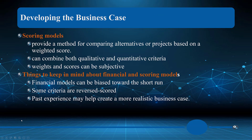Scoring models provide a method for comparing alternatives or projects based on a weighted score. We apply a scoring model equally to each and every project or alternative. It can combine both qualitative and quantitative criteria — weights and scores can be subjective, but the most important thing is to apply it equally to all alternatives.